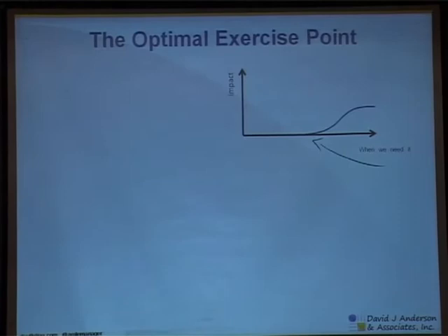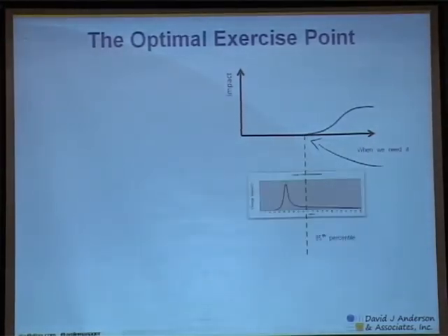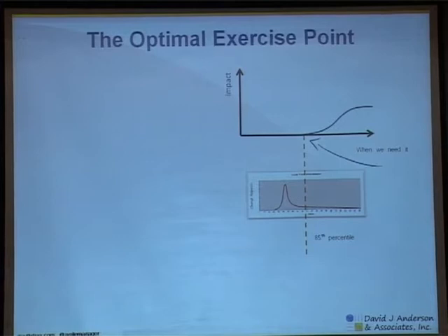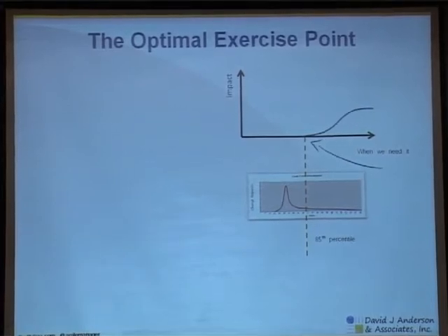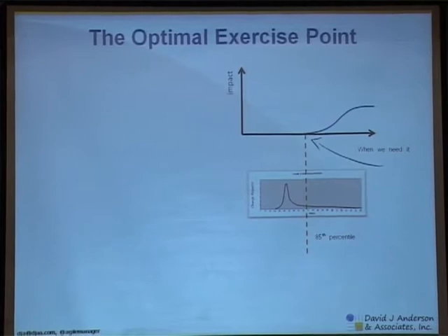Well, if we understand the lead time distribution through our system, we can determine the optimal point to start this item. So you look at the lead time here, and I'm looking at the 85th percentile, the 6 out of 7 point. And from that, we can determine that the ideal starting point for this is at this point in the calendar. If we could replenish the system with that ticket on that day, we have a 6 out of 7 chance of it being ready when we need it. And if we don't want to incur the cost of delay and we think it's slipping into that 1 out of 7, we could always expedite it later.